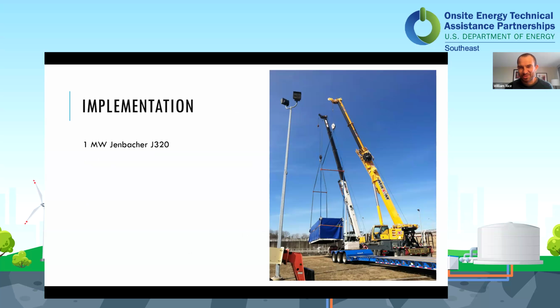I remember this day very specifically. We had the crane coming. I had to get a crane operator to come, and they dual lifted this 64,000 pound containerized 1 megawatt generator. The trailer was too long to make any of the turns in our treatment plant, so we had to move a bunch of stop signs and other obstacles to get it into location. And then we offloaded it on this very same day. The county was putting in a greenway bridge at our other treatment plant, so there were also a bunch of cranes over there trying to figure out how to put a 100-foot bridge across this creek when they couldn't reach from either side. So there was a bunch of crane activity happening on this very same day.